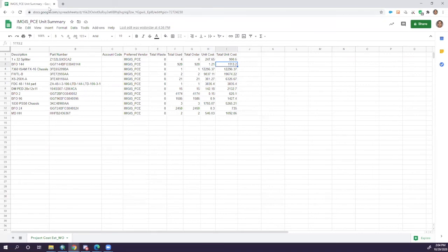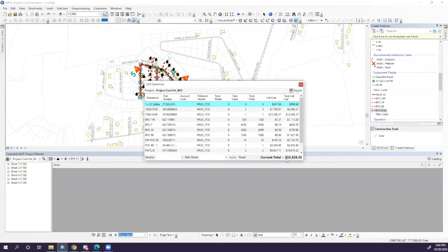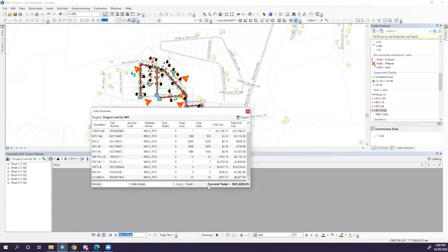So I'm going to be able to bring the units up here. Like I showed a second ago, I can also, at a quick glance, get a snapshot of what this project is going to cost. I didn't tie in labor rates to this specific project. I'm essentially just doing this one based on the network components, things that are going to be required for this project. So just getting a quick snapshot of what it's going to cost as far as the materials and equipment, network equipment that's going to be required for connectivity here. So I can very quickly bring up that data as well.